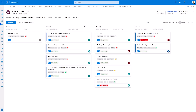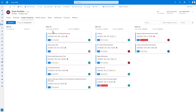With PowerBoard, it is now possible on a portfolio to have a Kanban-style view of all your initiatives. Being able to take those initiatives and drag them into a specific year. You will see at the top that it is possible to set up roll-ups to show, for instance, total budget and total benefits. When dragging and dropping in new initiatives, it is possible to see an approximation for this year. In this way we can do a lightweight simulation and rank the different projects.